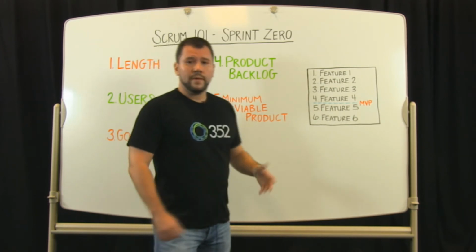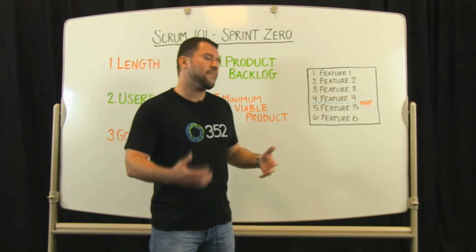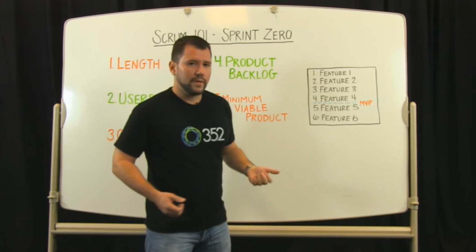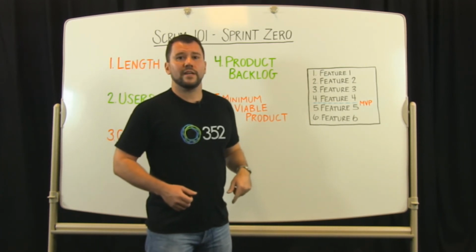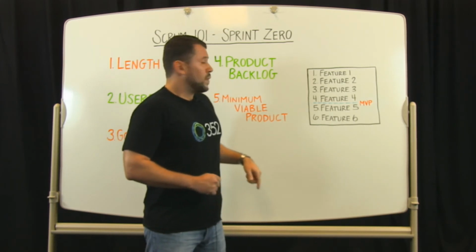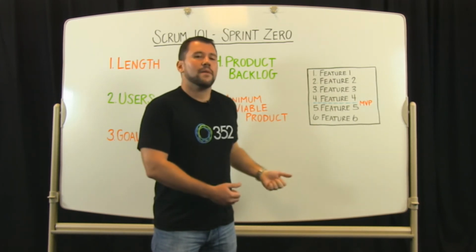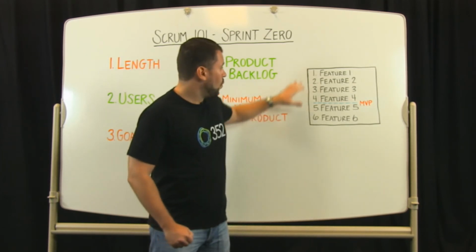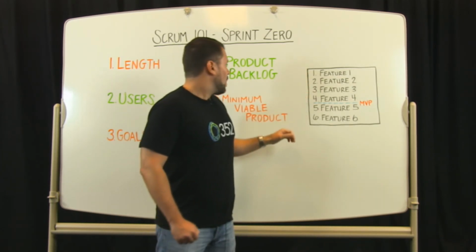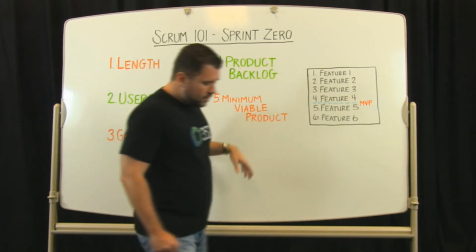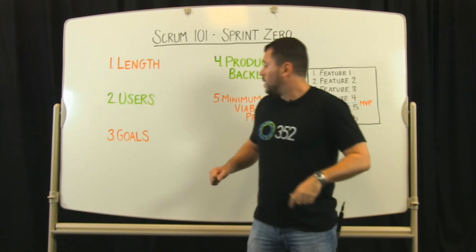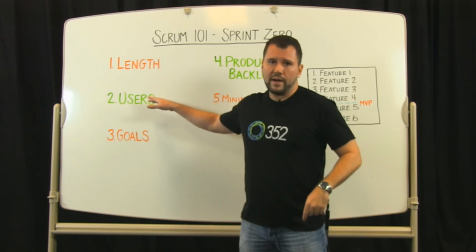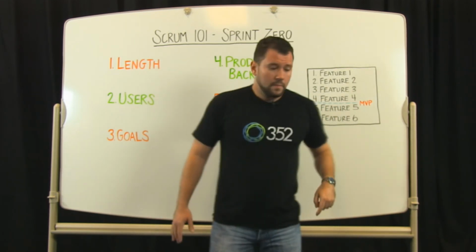At that point, because we have a limited time frame for an engagement, typically a number of weeks to begin with, and those will translate in a few sprints, we cannot deliver 1 million things in that time frame. So we have to start prioritizing and define what set of features from the backlog are going to get us to accomplish the goals that we've defined to serve the user base that we defined that is most important.